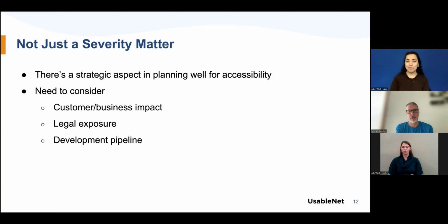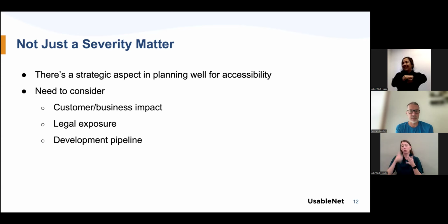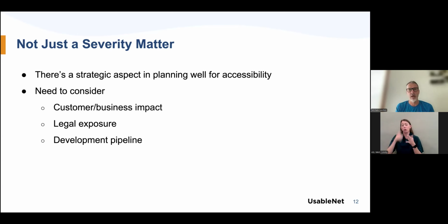Aspects that we need to consider are the business impact. Is the issue affecting a particular category of users or personas? So that might represent the prioritization itself. What's the legal exposure? Is the issue particularly impacting an area that is considered by the legal team as a big exposure to legal risks, that might have another kind of prioritization if we compare it to other requirements?